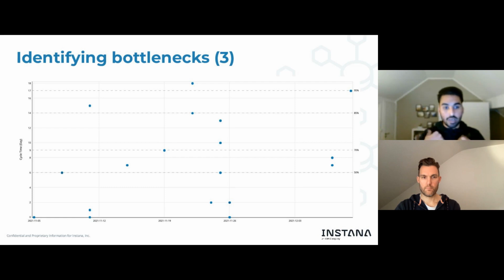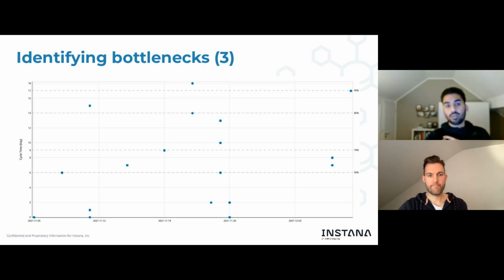And what you could do, maybe in one of your flow reviews, is always sit down and say, all right, let me check out only the cards that are in the 85th percentile or above, right? And show me, why did they take 14 days or 17 or 18 days? And you could talk about them and then try to have shorter feedback loops and see, all right, actually this card took 18 days. It spent 2 days in development and 16 days in QA, right?